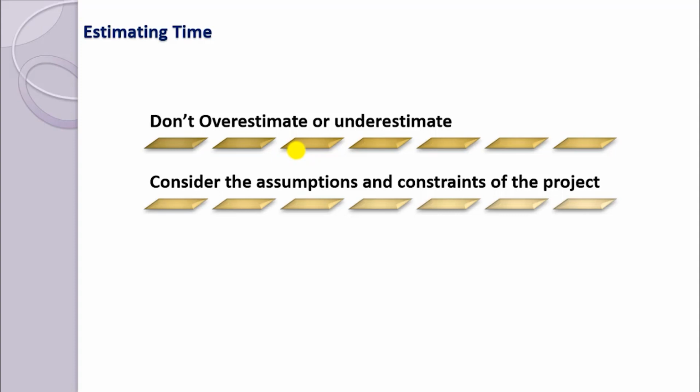I was in a situation where I had to deal with a client whom I knew for only one month. I was very new and they came up with a whole huge project requirement. Then I told them very clearly that we will move in an iterative mode. First, I can give you a prototype, and on that basis an estimation, and then we will go step by step, building the transaction masters. So it is a sequential process, an iterative process.